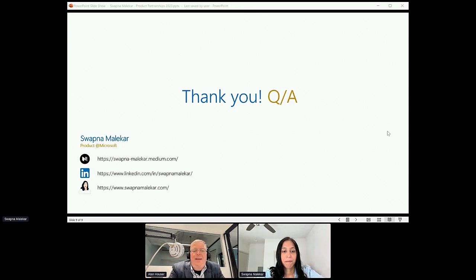Yeah, I think it depends on who you're partnering up with, right? So right now I'm partnering up with our internal product teams, the typical cycle time from ideation and finding that alignment to execution might be a month, maybe a month and a half, because as I was saying, there might not be any contractual agreements that we have to write down formally on paper when it's an internal team. It's another team in the same organization. Maybe you will have conversations about top level alignment, but usually those alignment conversations might take a month and a half, depending on how complex that product or engagement is.